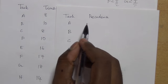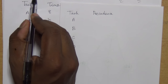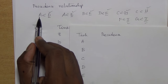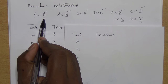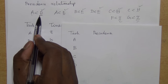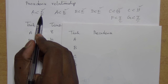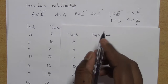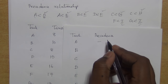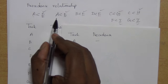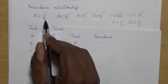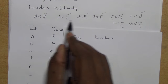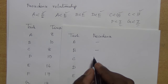We have to check whether A is located in the right-hand side of this relationship. For example, A less than D — A is on the left side and D is on the right side. We check whether A appears on the right side in any relationship. There is no A in the RHS of any relationship, so A doesn't have any predecessor. Similarly, B is not in any RHS so there is no predecessor for B, and similarly for C there is no predecessor.